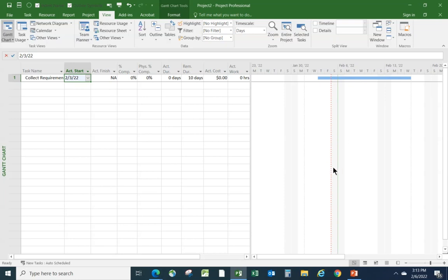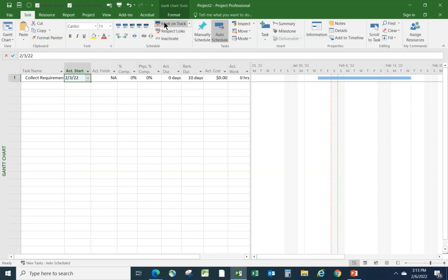Now, the follow-up question would be, okay, so if you started then, are you still going to need the full duration of that task to get finished? Because if so, it's going to push it out into this following week here through to 2/16. And the person may say yes. Now, if the person says yes, then I would leave everything like it is with one exception. I would now say it is complete through to this point. It's on track. And a quick way to do that, go to Task here and say that it's on track. Here we go. And project then calculates for you it is 20% complete.